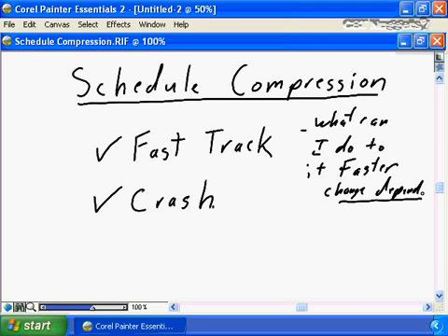Again, when we were originally setting up the dependencies, I told you to focus on mandatory dependencies, but are they true mandatory dependencies? Based on the additional information that you have at hand now that your project is well into delivery mode, are these in fact true dependencies, or can I remove some of the dependencies?